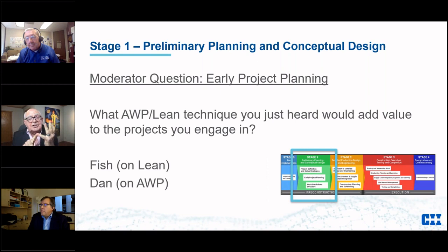And it includes a professional amateur, someone who doesn't know anything about this discipline. So the landscaper comes in and sits on the plumbing cluster group and asks the stupid questions that the subject matter experts would be ashamed to ask, but we need to challenge our assumptions. The goofy amateur comes in and says, well, why are you doing it that way? And we all go, gosh, I don't know. We've always done it that way. And then the plumber may sit on the landscaping cluster group.